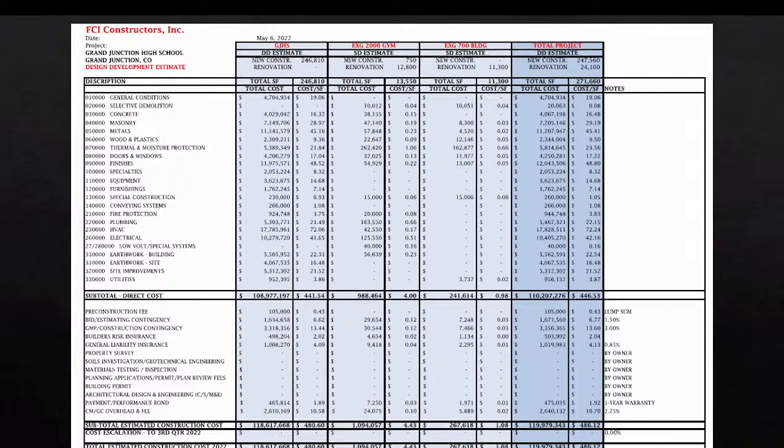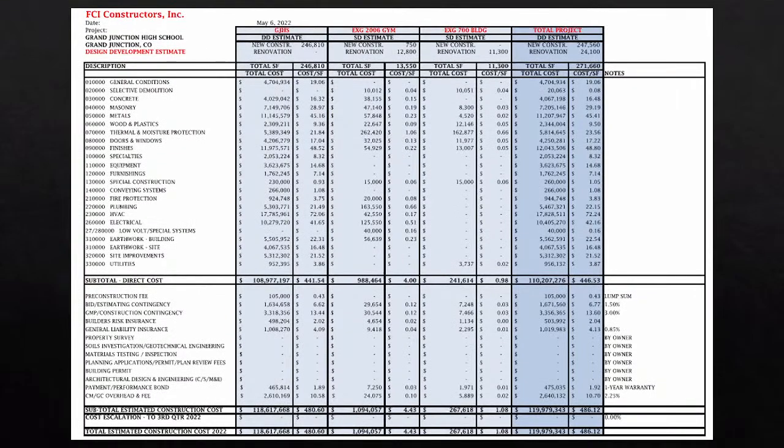And then the final bid package is in July that will have the 100% CDs for exterior finishes, all the interior finishes, metal studs and drywall, those types of things. We got a hard bid number for the helical piers, which we need to start at the end of June, and we have to get those ordered here in the next 2 weeks. So we have to go out for a hard bid number for that. And we had a hard bid number for some utility work that we're starting right now. So our next bid package is out right now, and that's where you get that competition, 2 to 3 different bidders.